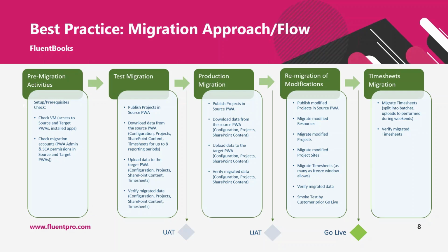But if there is a lot of data to be migrated and the environment cannot be frozen for a long period of time, like users constantly need to work with the data in the source, then there will be an additional step, so called delta migration.